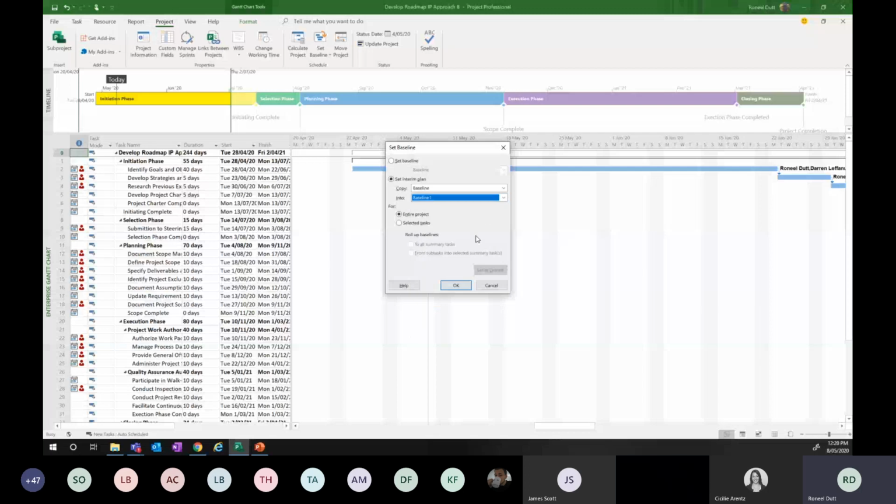Therefore, you move what you originally had into one of those cached baselines, and you can actually save that as a snapshot of your project. And then you can go back and say, now that I've copied across my original baseline and I know what it looks like, I will reset my baseline or re-baseline my project. And what happens as a result of that is all your reporting still gets the critical data using the reference point of your new baseline. Although if you were to run an audit on the project, you could go back and look at your original baseline, if I can use a term.